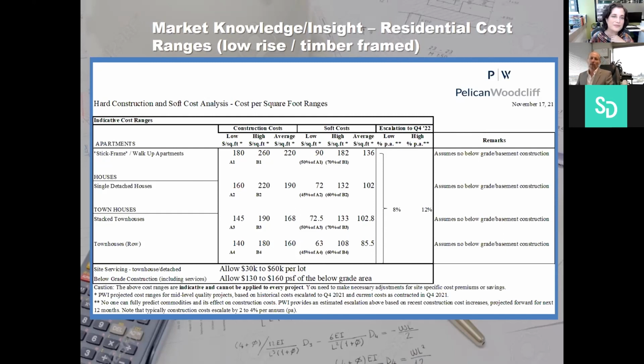That's a good question. Well, missing middle, too early? Yeah, my understanding of missing middle is more of the infill projects. I think with just my experience and my opinion, and please just take it as one opinion in many specialists, I'm sure. But from a cost perspective, I don't see efficiencies in precast solutions until you get into bigger volumes. So maybe the walk-up apartments, that's where you can get, especially if you have a certain product that you're just going to cookie cutter throughout a neighborhood. That there may end up being 10 projects, but you're using the same design solution.